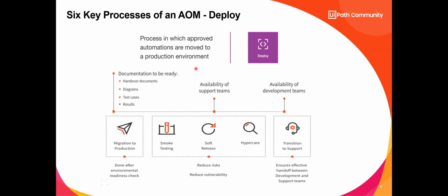During this process of deployment, we want to make sure our support teams are ready because they're fixing to get it after we get let go of it. And we want to talk about hypercare. Sometimes with quick wins, hypercare is several weeks. Sometimes with must-do improvements or long-term improvements, your hypercare can last up to 90 days in some cases.